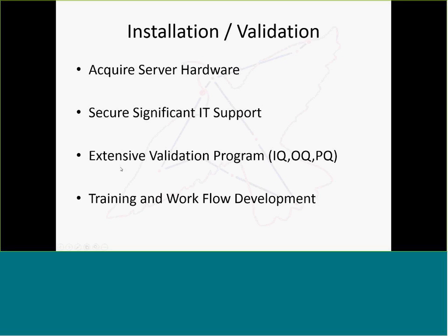Next, you really do need to validate these systems. Just because the vendor says their system is validated, that means they validated their process of writing the system. It does not mean that your installation is validated. You need to do an IQ, OQ, PQ validation program on your installation. You validate the internal workings of the program, but you have to make sure the system works the way you expect it to.